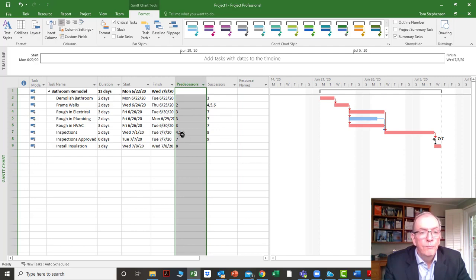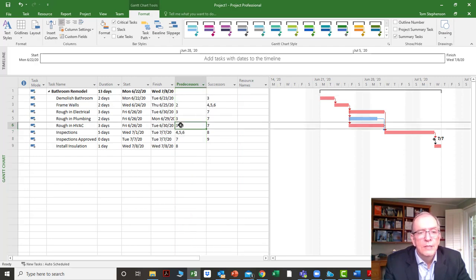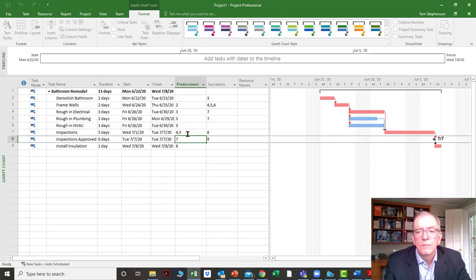Now, a good thing to remember is if, for example, Ruffin HVAC, you remember how I didn't have a connection there before? Or I didn't have number 6 connected. So I'm just going to click there and I'm going to back up, press enter. You notice how when I don't have that, successors is blank. So this is one way that you can check to make sure you don't have any open ends, so you don't get fooled by the scaling of the bar chart.